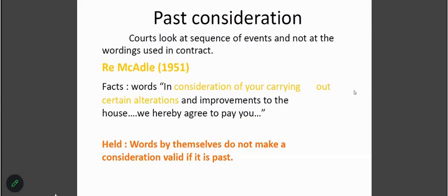That means by word, the contractor says, oh, I did this, did that. But no, it must always be validated by the appointed quantity surveyor or the professional engineer who surveys the place, whether the job is complete based on the schedule and the contract obligation.